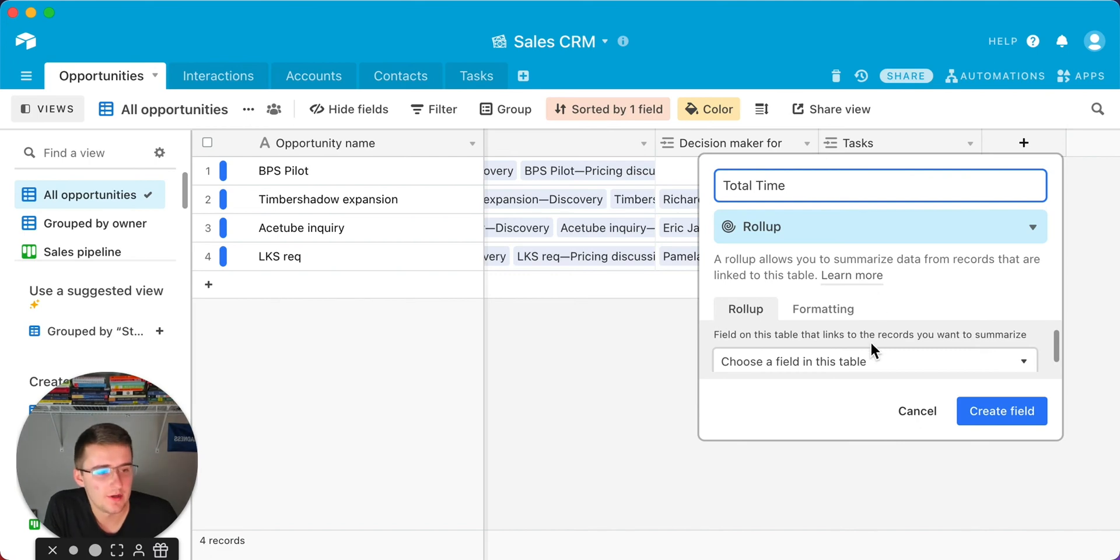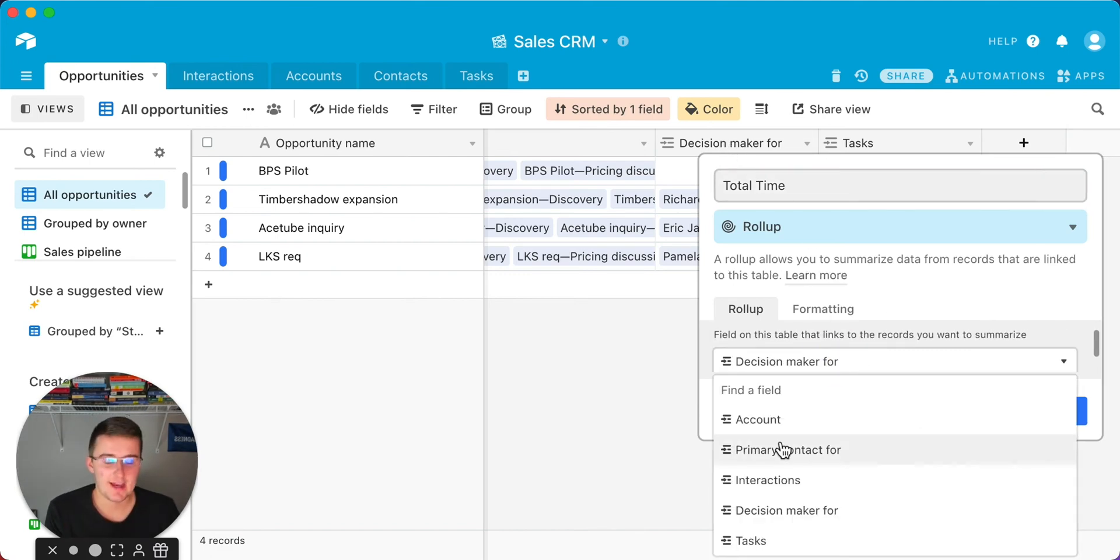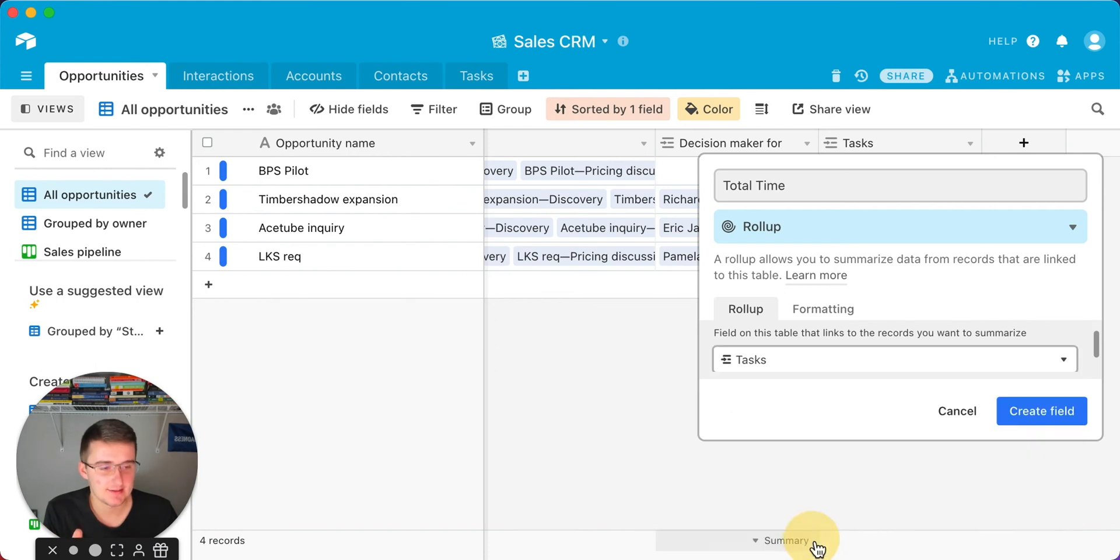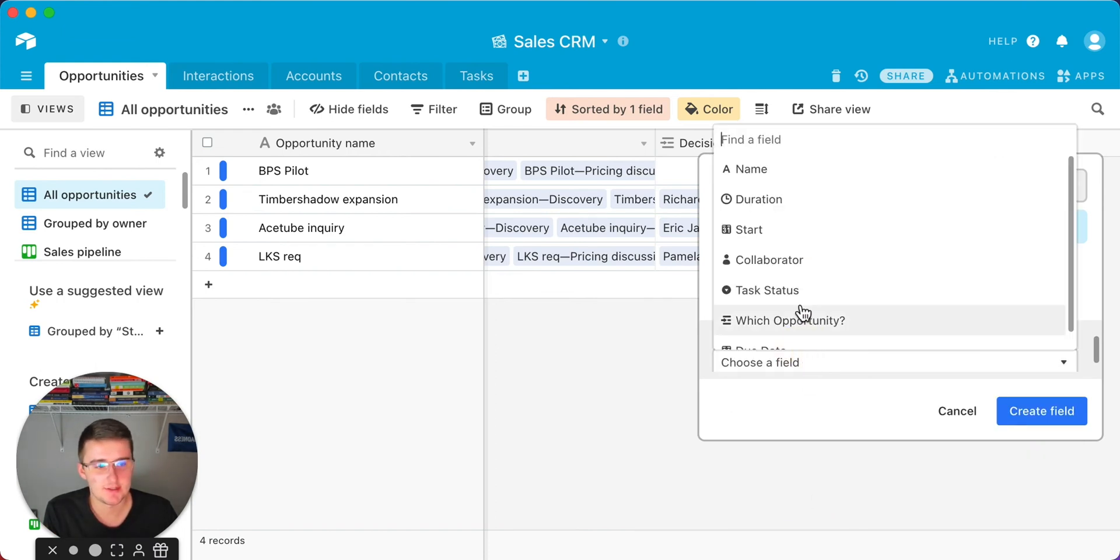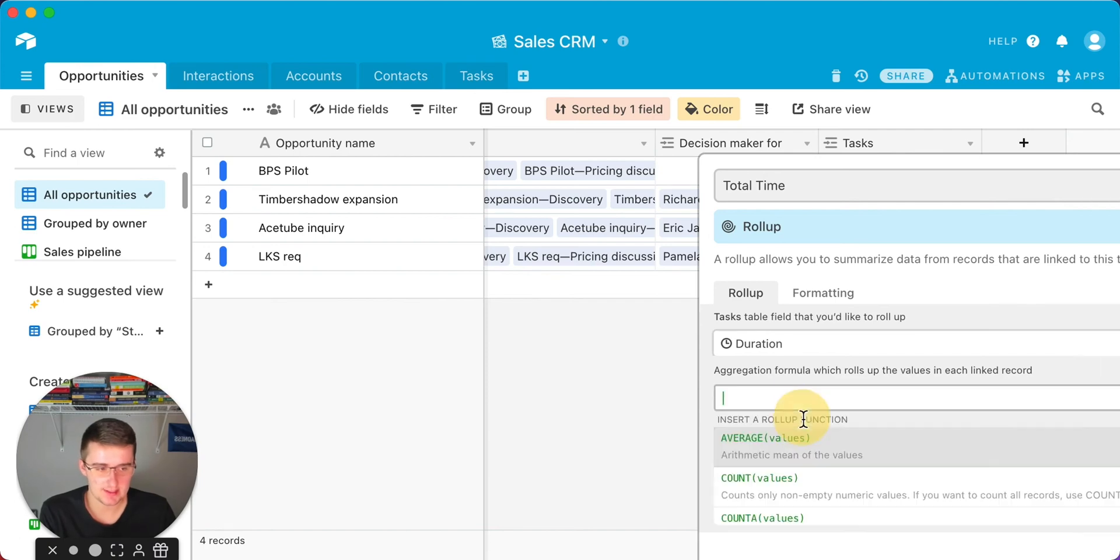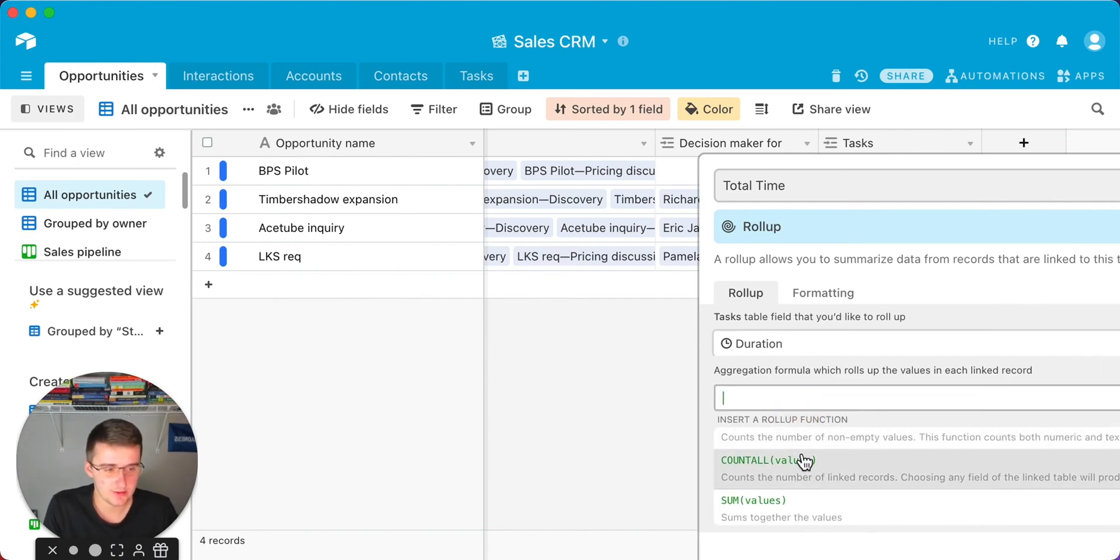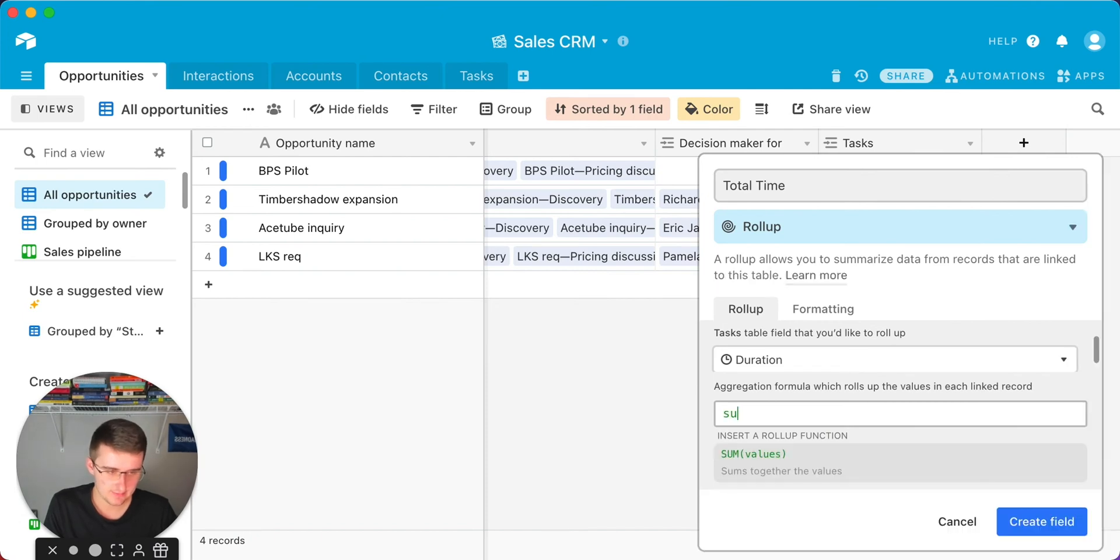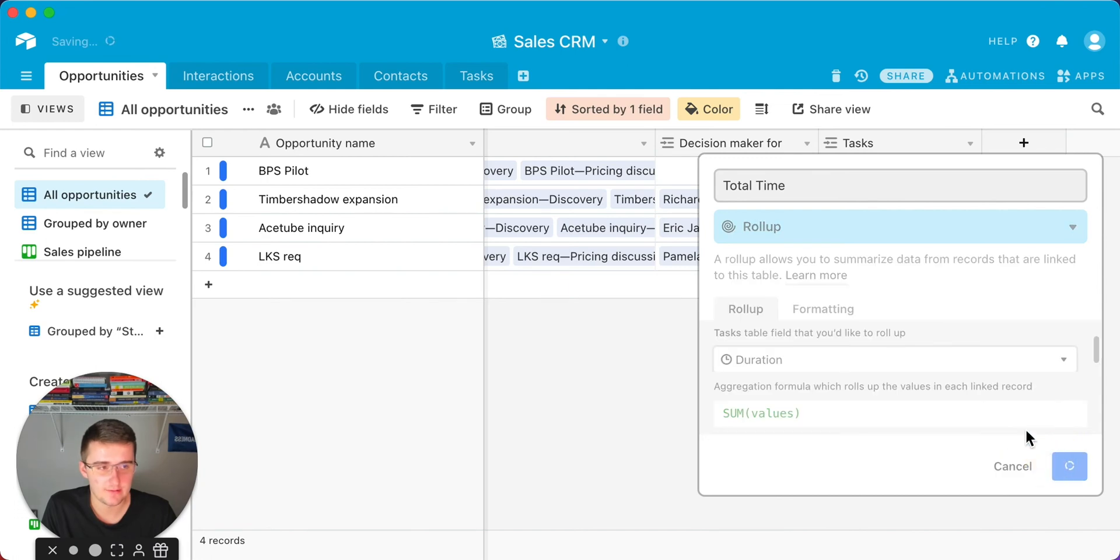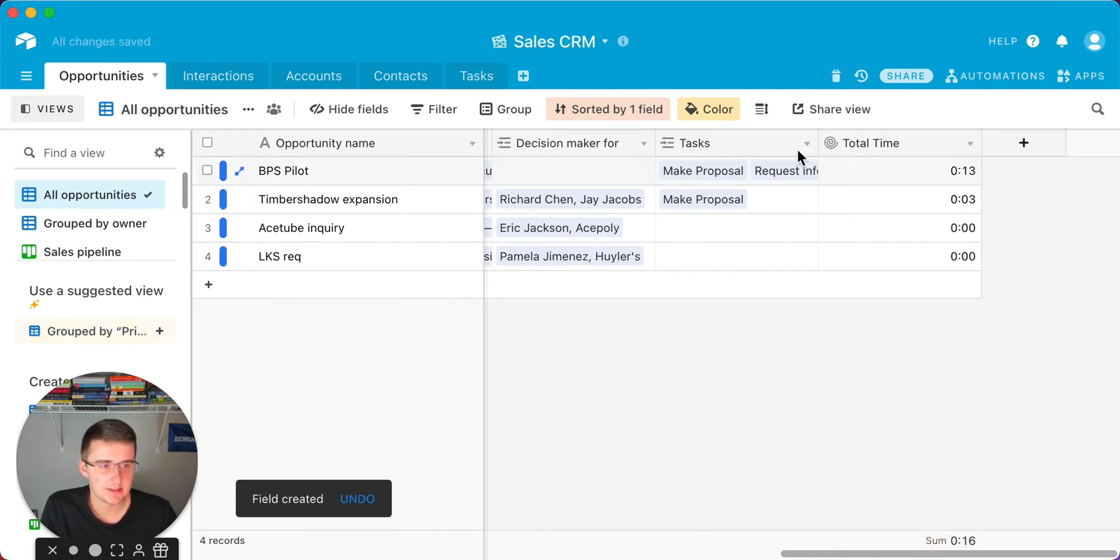What you're going to do is scroll down here, and you're going to select the fields in this table. The actual linked record you want to pick is actually the tasks linked record. I totally missed that when I was editing it. So pick the task linked record. Then now what field you're going to choose is you're going to choose the duration field because you really want to summarize the total time spent. What you're going to use is a sum formula. If we scroll down, you can either type in sum, or you can just scroll down. If I type it in, sum values, just click on this, and then click create field.